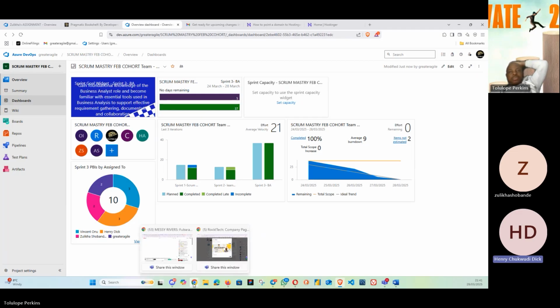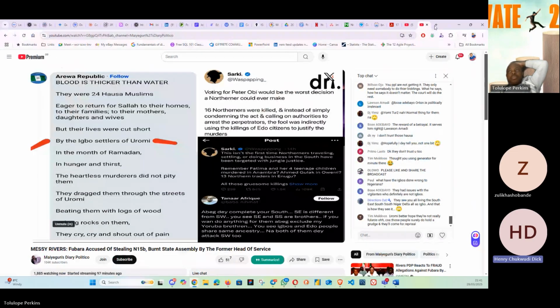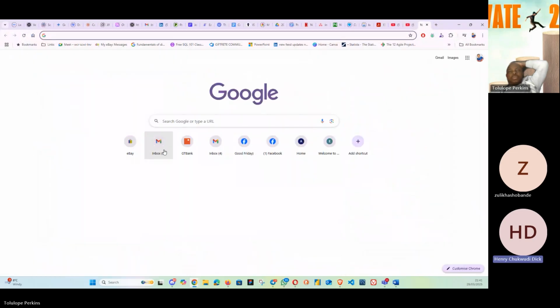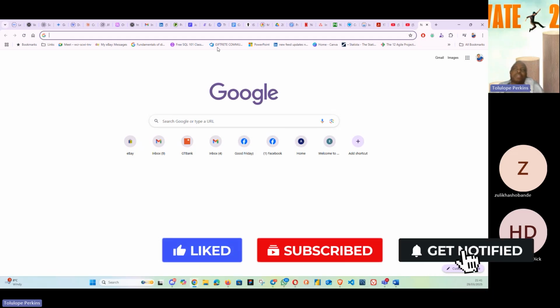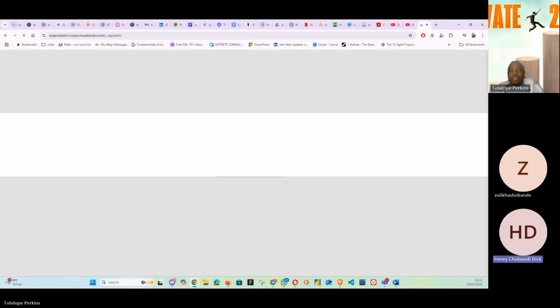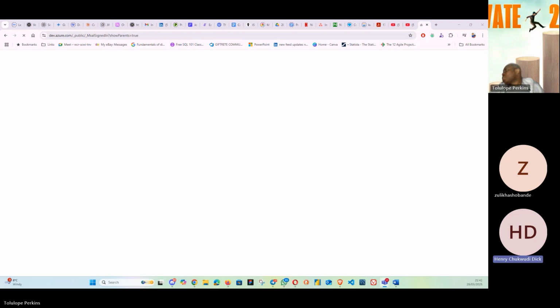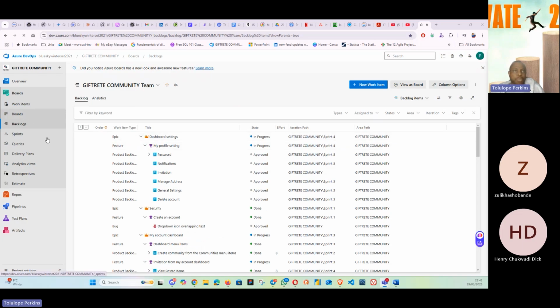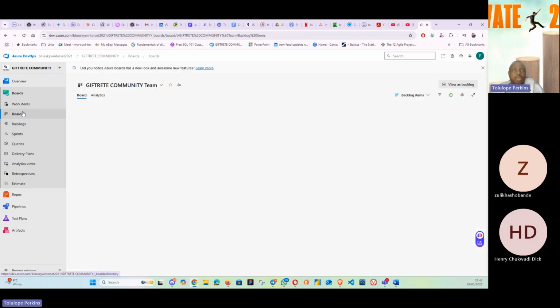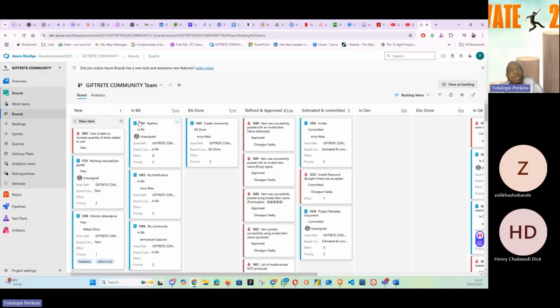All right. So what it means is that if you are doing the first and second sprint, you won't be able to generate the velocity. You see the velocity now, but you don't have it. You generate the velocity from your first sprint. As you go on, it becomes valuable because it has to be up to 3 for you to get an average. Because yes, you need to get an average. So it starts to generate it from your first sprint. But you know that for our first sprint, you'll be guided by the first one as well.